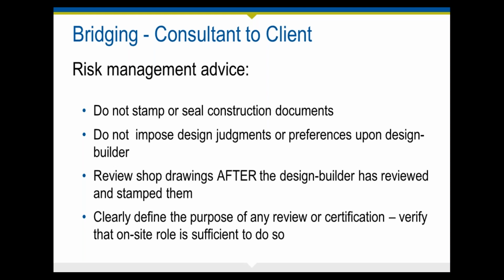So if indeed you are expected to certify about substantial completion or whether construction was done in a certain manner to be able to get a certificate of occupancy and so on, make sure that it is clearly stated what your role is and that you have done the necessary services to be able to certify as to those conditions. Again, these concerns can be addressed contractually by making sure that your scope of services is done correctly.